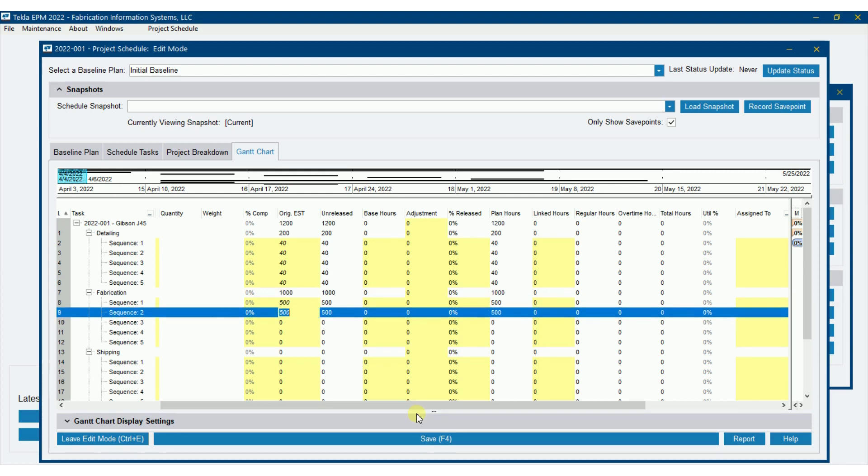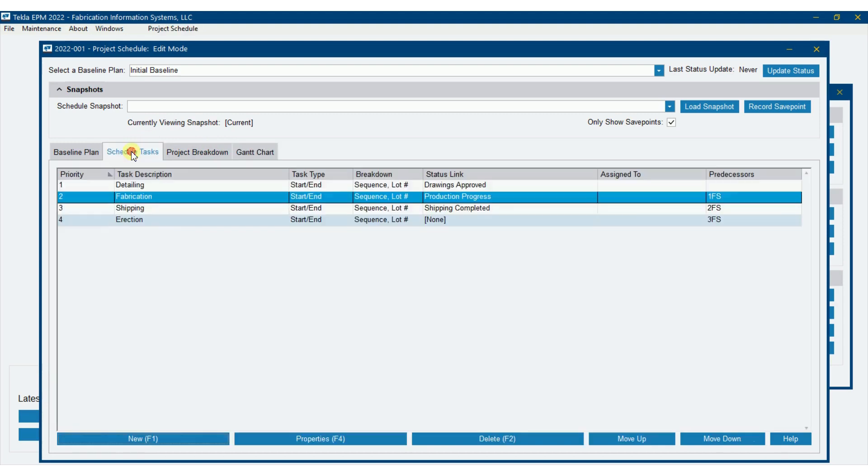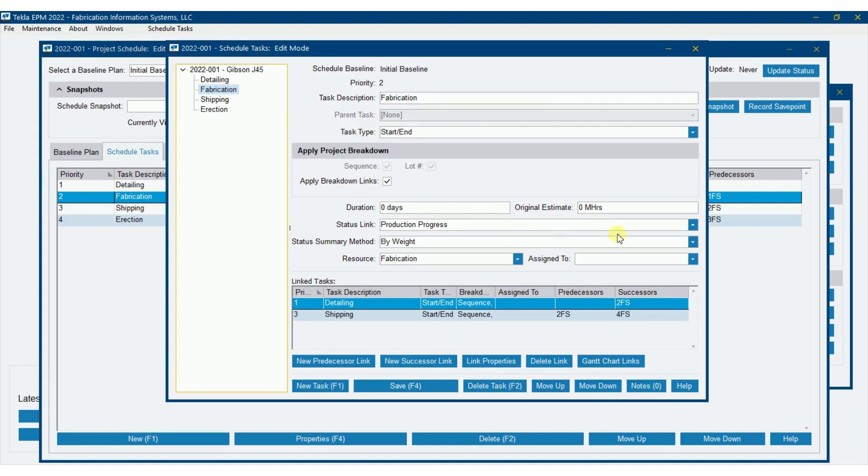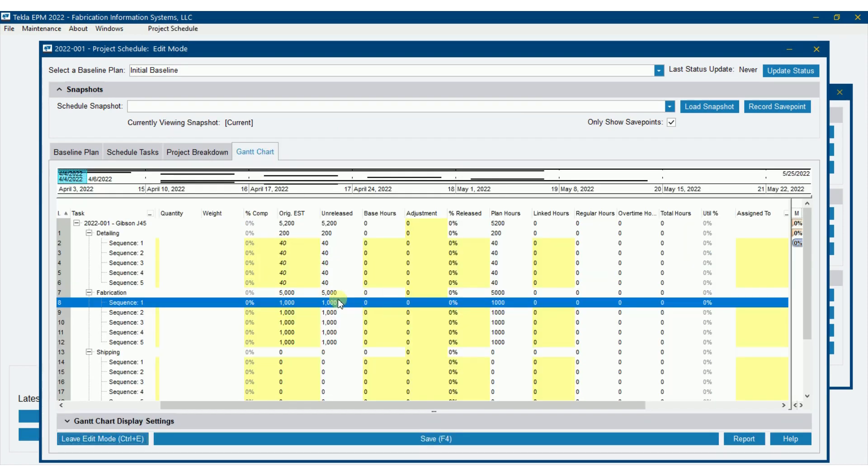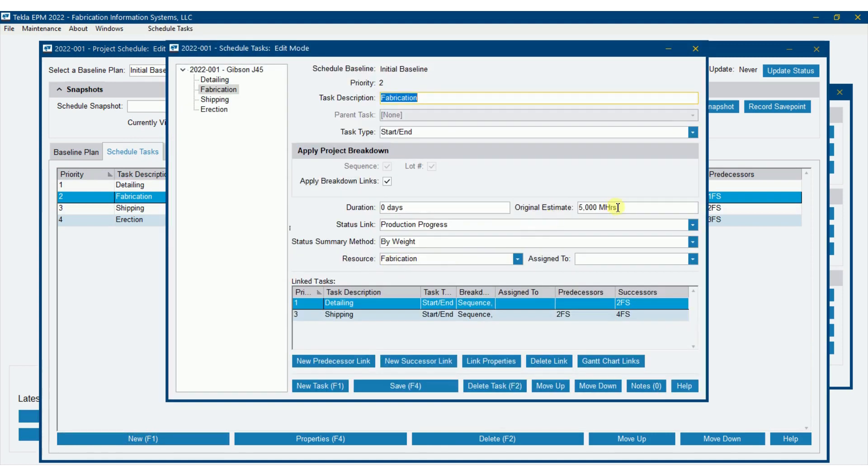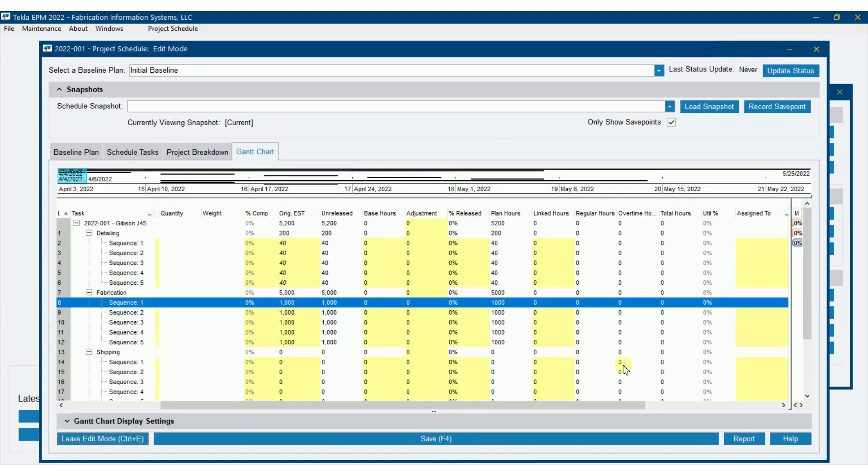Now let me illustrate here one thing we can do. I'm going to back this back out. One thing I could do is to come over here to schedule tasks on fabrication. I told you I like to fill this out on the Gantt chart. But you could right here say that this is 5,000 hours. Save. And then on my Gantt chart, it fills in and splits that up evenly amongst all of the sequences. So I kind of like filling it out here, but you can do it this way if you'd like. It's a very effective way to do it. Put in your total estimated hours for fabrication and it splits it up evenly amongst every sequence here.